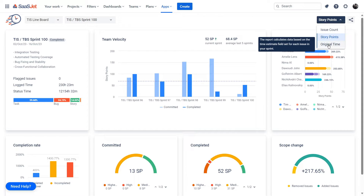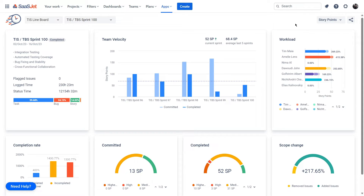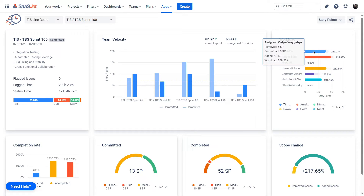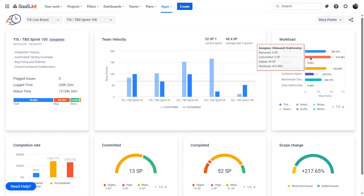Workload refers to the volume of work assigned to individual team members. The report displays the committed, added, and removed issues for each team member associated with issues at the end of the selected sprint. The stacked bar charts show committed, added, and removed work for each team member, helping you track and analyze their contributions. Hover your mouse over the line of a specific assignee to see their workload breakdown.